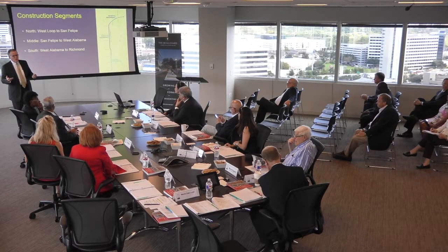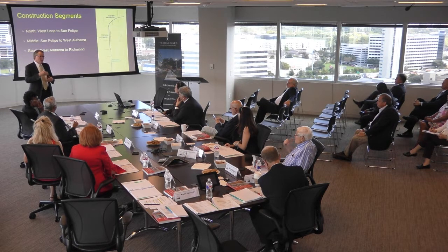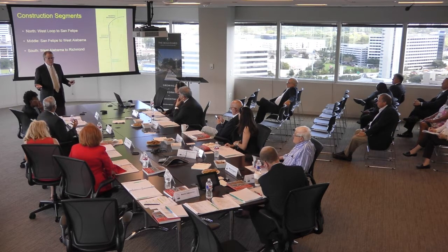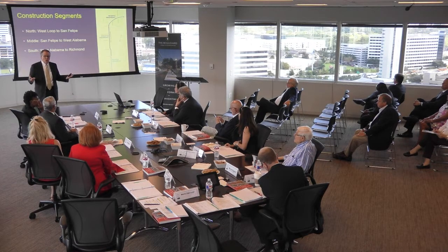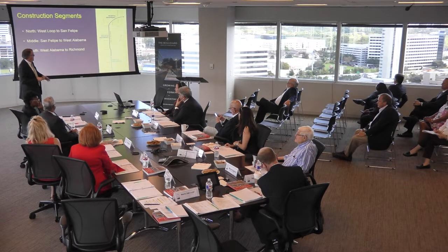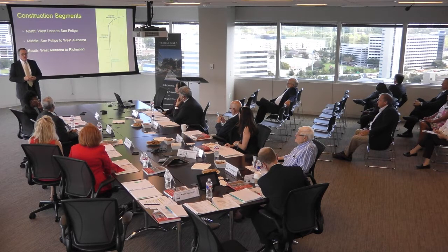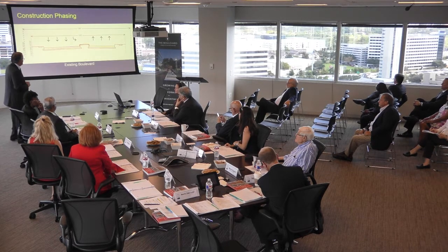The real question is, can we get competitive bids? If we were to bid this as one bid and don't get good competitive bids, we could always go back out and break it into 2 pieces, where a lot more contractors would be able to deal with it. We are certainly leaning towards coming to you in the next month, I believe, to ask for your authority to bid this, and it will probably be bid as one package.